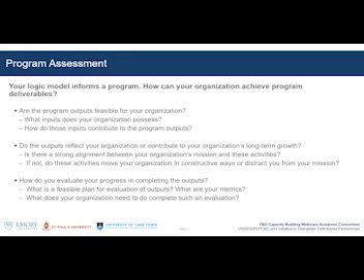A lot of times funders ask organizations to think about ways to demonstrate and to measure impact. An impact evaluation cannot be feasibly conducted unless some processes for earlier evaluation are being carried out in relation to your outputs.